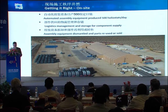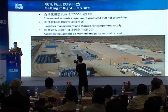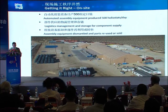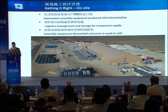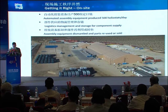But one of the keys to reducing costs and ensuring a successful project was the use of Six Sigma, meaning something virtually free of defects, 99.999% free of defects. We used it to address design, procurement, and construction challenges, and we targeted 5 areas: material handling, heliostat assembly, field transportation, solar field installation, and power tower erection. And in each area, the team found new and more efficient ways that drove greater performance and better results.